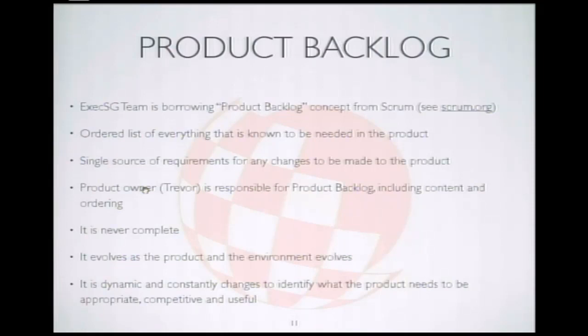This is kind of an interesting way to run things because, in software, you always have something new to do. Always, always, always. Because the environment changes. It's not just you, your product. The environment around you changes, and you've got to add a new feature, run on new hardware, whatever it is, right? And so one of the things is a product backlog is never complete. So you've got to make sure you've got the priorities right. And I think we could safely say on AmigaOS, we have a product backlog in Bugzilla, and there are bugs in there that will never be fixed, ever.